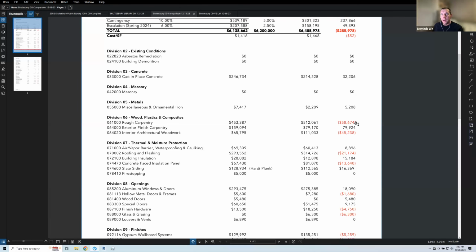We also were looking to simplify the roof eave detailing and make a better performing roof with regards to roof insulation by using glulams throughout the project. In SD, we had the building split into LVL structure and 2x12s, and it was complicating the roof edge condition. That decision was made to get a better performing envelope, so we saw a slight increase there.